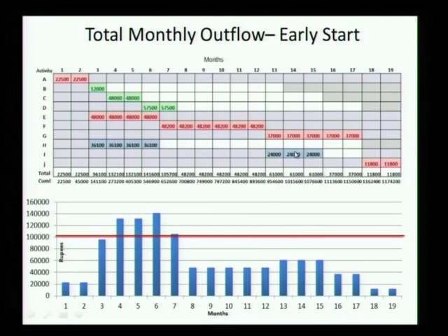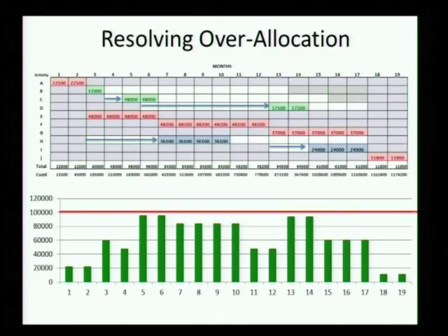Here we have 5 activities which could be moved. So my decision space is activity B, number of days by which I should move. Activity C, number of days. Activity D, number of days. That is my decision variable, and the number of days might be 0. If we go into the solution we just got here, the solution says C by 1, D by 7, I by 2, and H by 4. So that would be the solution which gave an acceptable result.